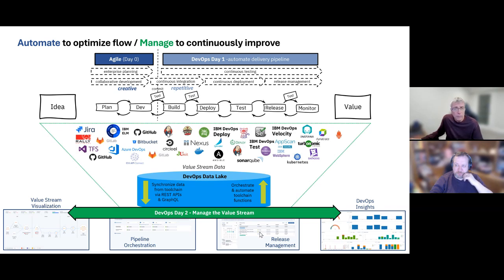We have a release capability within Velocity. So again, I can manage all the tasks around a release, whether those are automated things that are happening in deploy or whatever, or maybe it's a manual task. So maybe there is a manual piece that we have to go through in the release. The release management helps me organize that and create basically a checklist. And some of those tasks can run in parallel, they can run sequentially, or whatever you want to do.